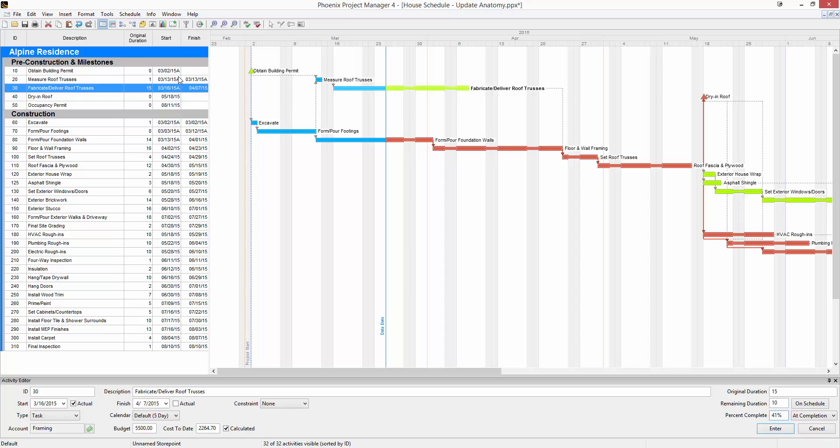Over here in the columns, next to some of the dates, you'll see a capital A. The capital A means that these activities have either actually started and or actually finished. You make a date actual by checking the box down here in the activity editor.